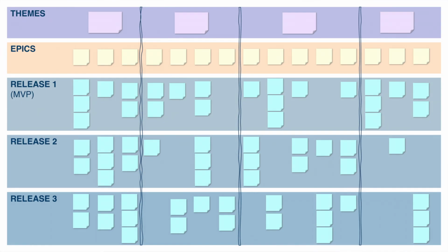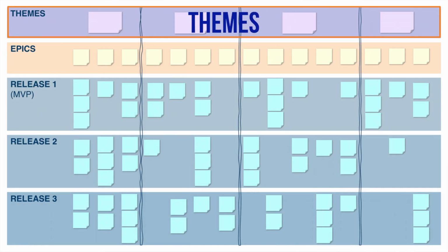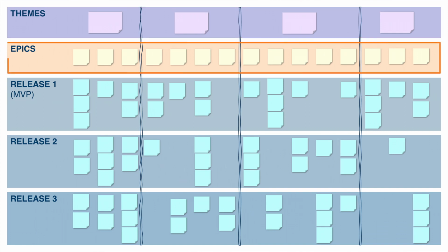User story maps are usually presented like this. At the top, the themes or user activities represent the highest level of the things that users will need to do. Below these are the key steps in the process flow through the product or the service, arranged in a horizontal row. These are the major tasks that the user will need to perform, arranged in the sequence in which they'll need to perform them. In the language of user stories, these are big stories that we call epics.